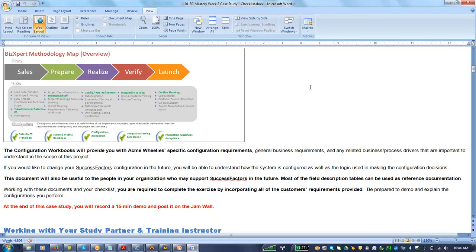Things can go wrong in the realization testing phase, where the systems will not be in sync and there will be some issues arising. To fix that, it would probably take a lot of coordination and effort with SuccessFactors, which might take some time, and because of that, it could get delayed as well. There is a buffer as well, say about a month. They keep it as a buffer, and typically 3 to 4 months is what you expect for a project to be finished. Okay.